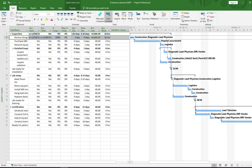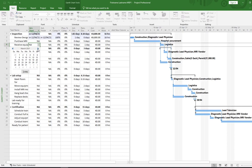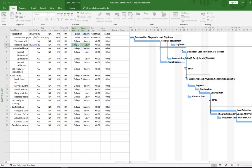The project fills in the actual start and finish date and we have our actual and remaining duration. For simple updates you can also add values directly into the table. For Task 4, click on the actual start cell and type April 23rd, then press Enter. Then enter an actual duration of one day and press Enter. Project automatically calculates the remaining duration, which is quite handy.